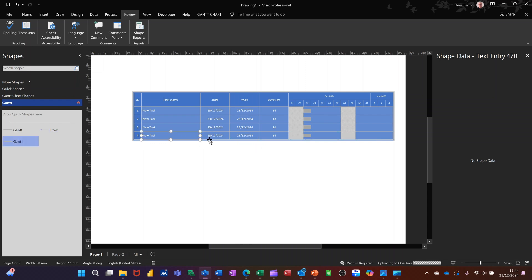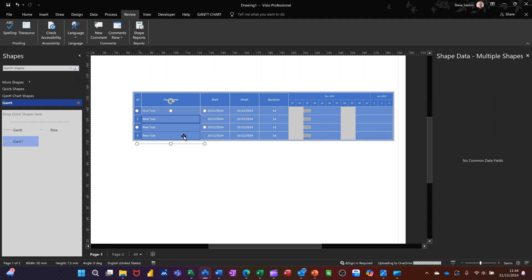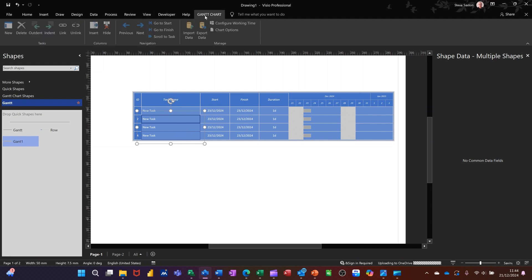So the way you would do that is you click on the second one down, hold your shift key down, click on the third one and then the fourth one so all of these are selected. Go up to the Gantt chart tab and indent.